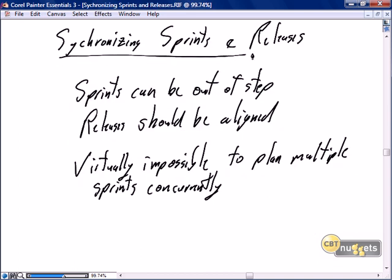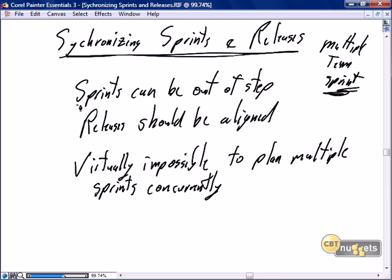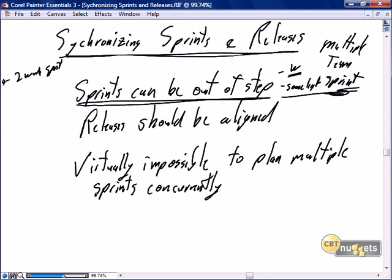And a final principle that I want to leave you with in this nugget is, as we scale Scrum and we have multiple teams working on sprints, how do we keep everything synchronized? Well, as far as sprints goes, I don't think we need to synchronize sprints. We don't have to have every sprint finishing on the same day of the week on a Wednesday, nor do we even need to have all sprints of the same length. Team 1 may find they work most effectively in a 2-week sprint, and team number 2 may find that they like a 4-week sprint. And team number 3, being the oddballs and liking the number 3, like to work in 3-week sprints.